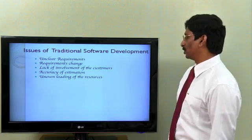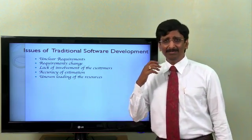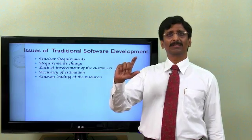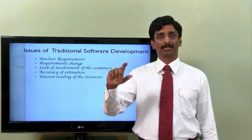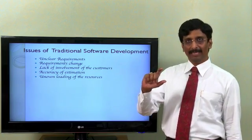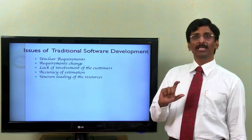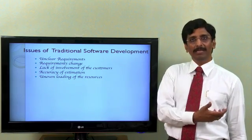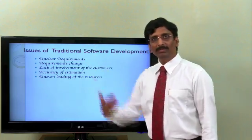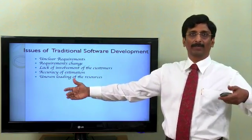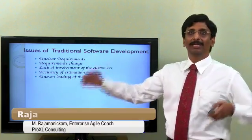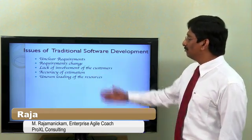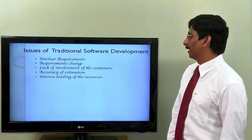Then, uneven loading of resources. For example, during the requirements phase we involve business analysts, during the design phase we need architects, during the coding phase we need programmers or developers, and during the testing phase we need testers. So these people are not leveled throughout the development life cycle — they come in and perform a role in different phases. So the resources are not leveled properly.